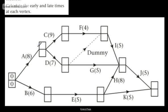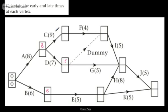We need to think about the early event times. The earliest we can get to the first event: starting at zero with only A feeding in — that's eight days. Considering the next event: B takes six days from zero, so the early event time is six. Then considering D: starting at eight, D takes seven days, so the earliest we can complete is after fifteen days. For C, dependent only on A: we can start C after eight, and C takes nine days, so that gives seventeen.